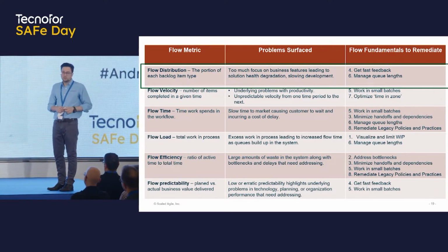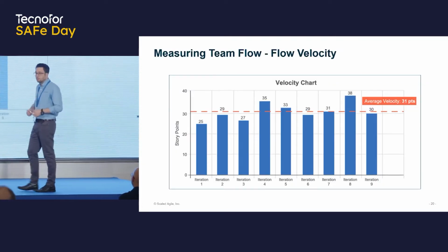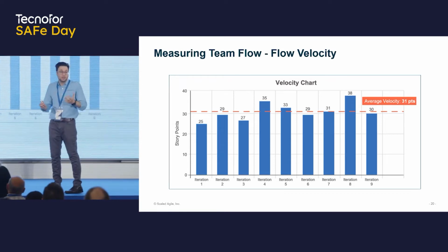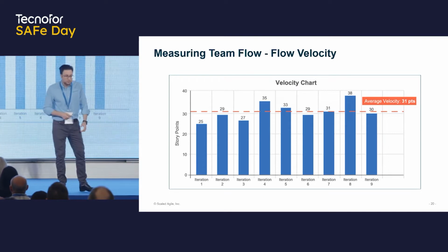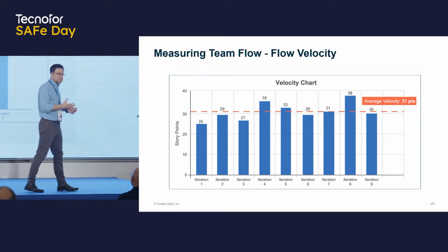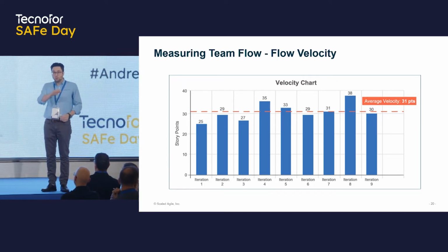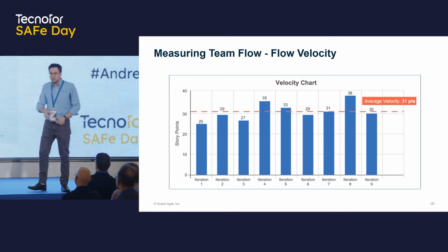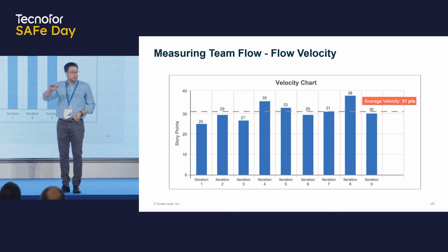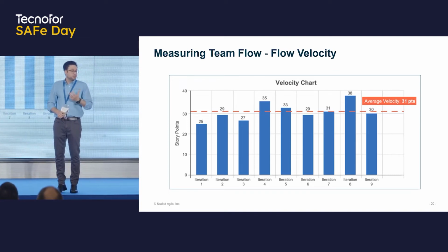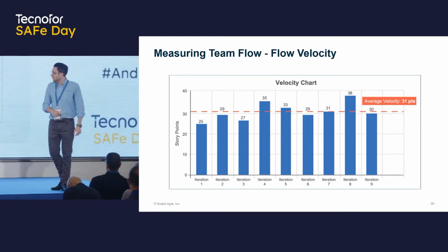Let's have a look at the remaining flow metrics. Team velocity, you've seen this before. It's very familiar, either measured in story points or number of stories. Again, we recommend this as a great measure for all agile teams. For 2 reasons, really. Flow velocity is simply measuring the productivity of the team. So all things being equal, we're going to see the productivity go up to a point. Eventually, the second thing we want to see is a nice stable productivity. Is the velocity predictable from iteration to iteration? Does it allow the team to clearly plan and understand their capacity?